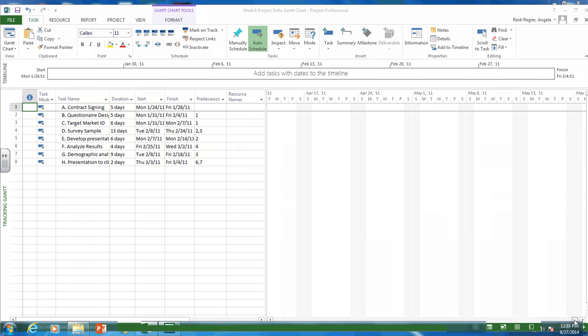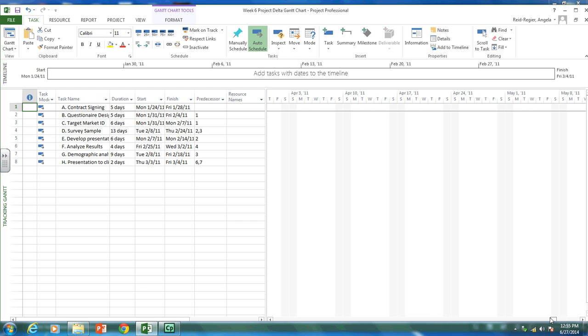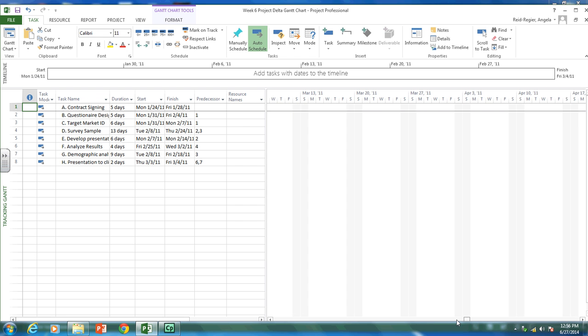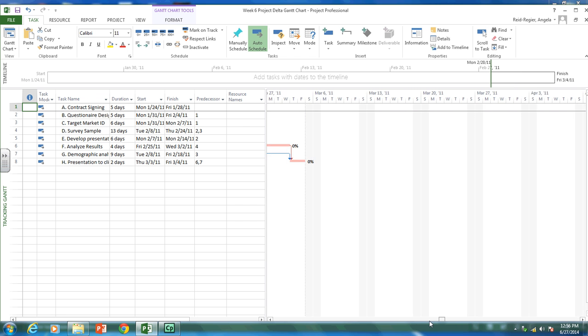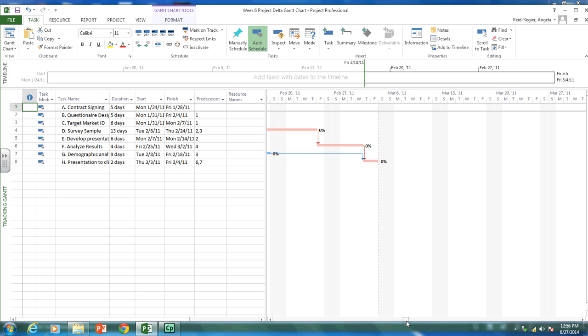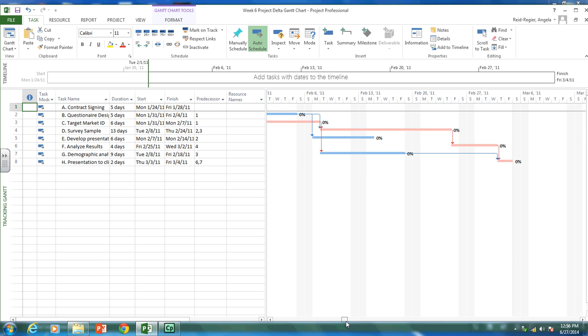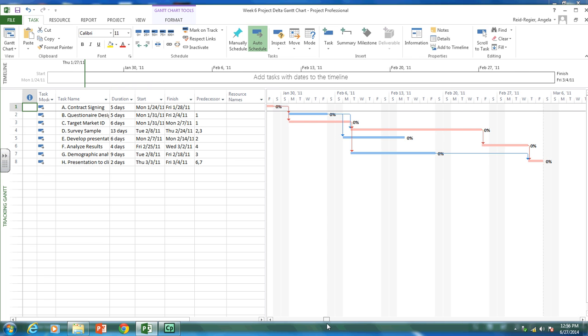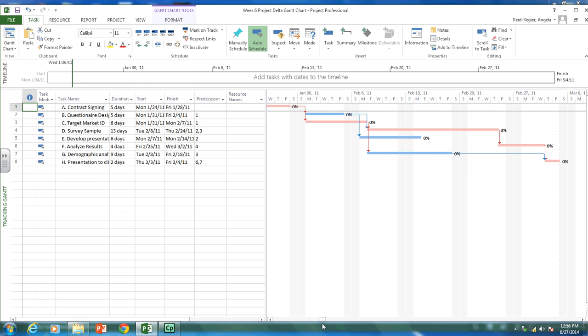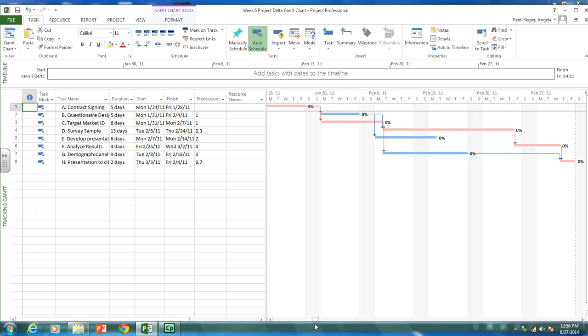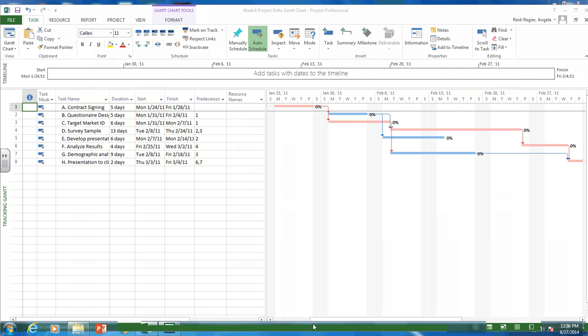Now things have disappeared. We need to go back, scroll back to January 2011. And now you can see our Gantt chart looks a little different. One of the differences is in the tracking Gantt chart view is we have red and blue. Red identifies the critical path and blue identifies non-critical activities.